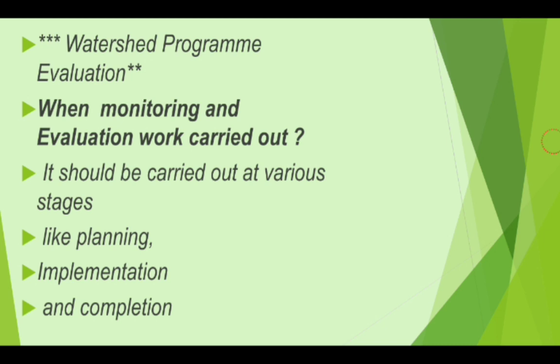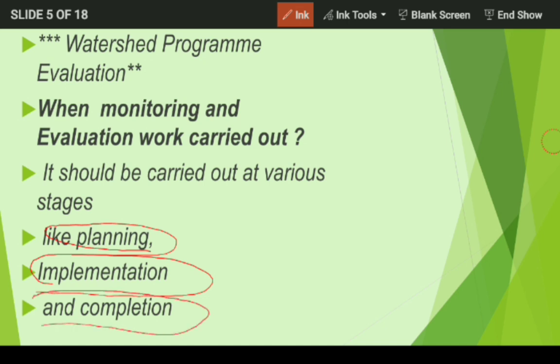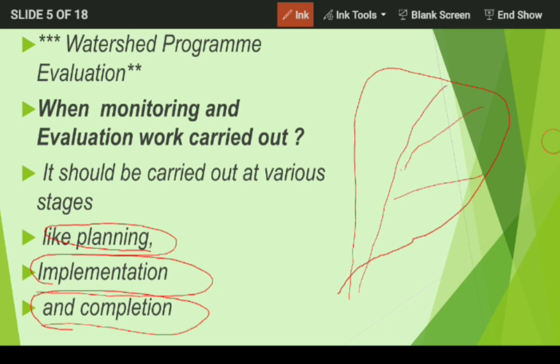When is monitoring and evaluation work carried out? It is carried out at various stages: planning stage, implementation stage, and completion stage. Monitoring and evaluation is necessary at the planning stage when preparing a project plan. Once we prepare a project plan, implementation work follows, where we perform different treatments in the watershed area like gully plugs, check weir, and check dam.